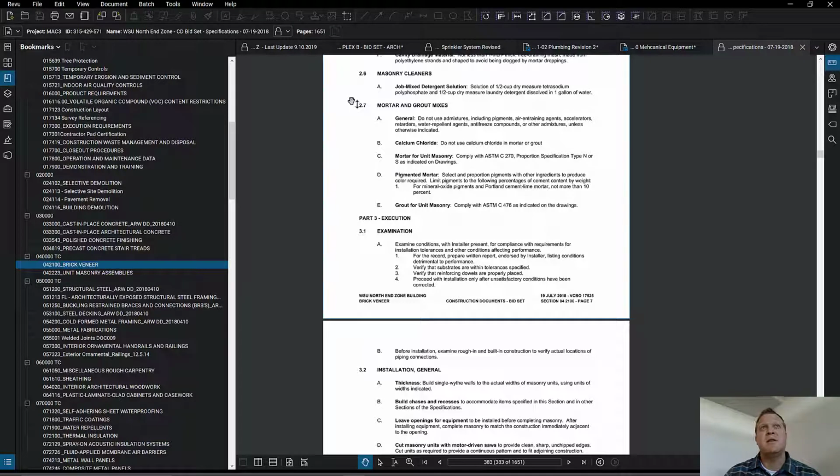Sometimes it's not part of the original contract document, but at some point in time they have to amend the contract showing with the client what the contract duration will be, what the construction duration will be. And I've seen it also that's not used at all in some residential, some light commercial. They don't use that, or even some larger commercial jobs. The schedule is not a contract document.